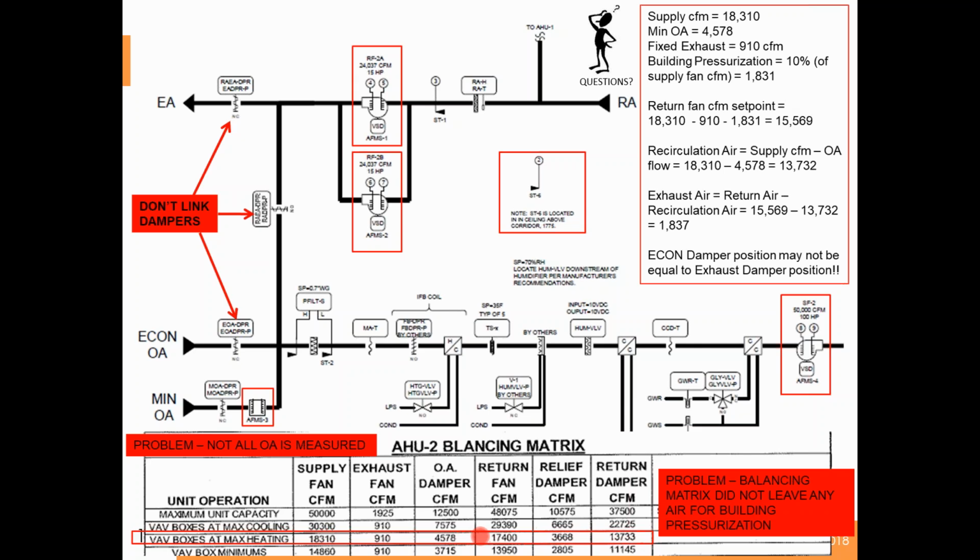So running through these numbers is really important when you're going through this in commissioning and looking at this. Don't expect to find this matrix on most of your jobs. It's few and far between. I'm going to say, as a commissioning person, expect to have to crunch these numbers.